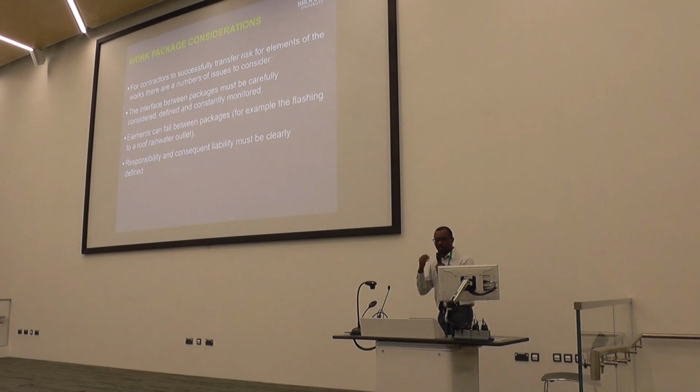If you don't carefully consider the interface between these subcontractors, and you think, oh, it's easy for me to just have 20 or 30 work packages outsourced to so many contractors, at the end of the day you as a project manager will have difficulties managing and coordinating all these people in terms of information flow, and how to get them to work.